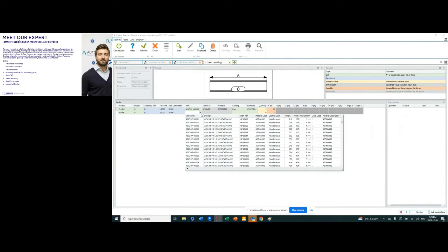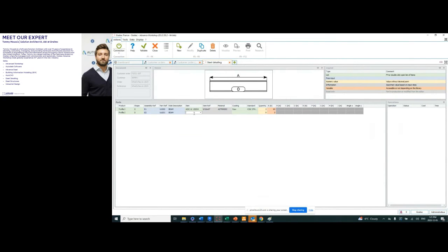So for example, if for a specific bar element you're always purchasing in 20-foot lengths or 30-foot lengths, you'll have those predefined in the SKUs. And then once we put in the input length of the actual bar required for the project, it'll then compile the cost in accordance to that percentage of material consumption.